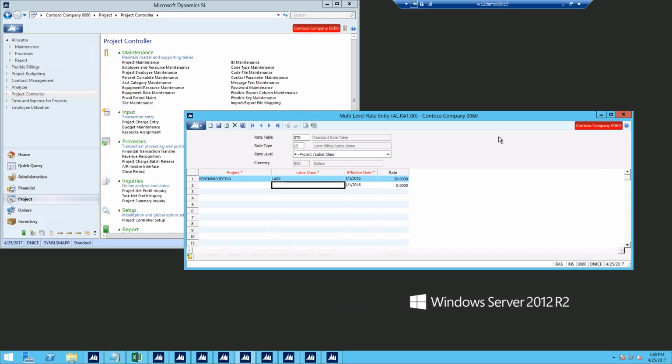Okay. I think we have time for about one more question here, and then we're going to get going. Is there any way to stop T&M billings automatically when it reaches a contract not to exceed amount? Yes, there is. Well, it doesn't stop. Well, let me back up a second. It doesn't stop the T&M, and it doesn't stop the allocation. What it does do is it then puts it into an offset account. It does not go on to the bill.